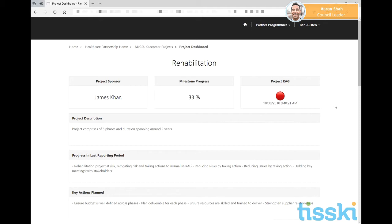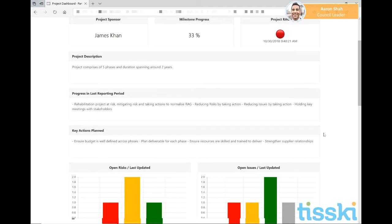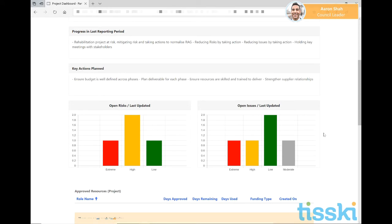So clicking through then into the rehabilitation project, we can see again key information that's of interest to our external stakeholders like Erin. So we have the project sponsor for this particular project, how far we are in terms of progress to the next milestone, and the overall RAG status. And we then have some more narrative detail around a description of the project, what progress has been made since the last reporting period, and any key actions that are planned for the next period.